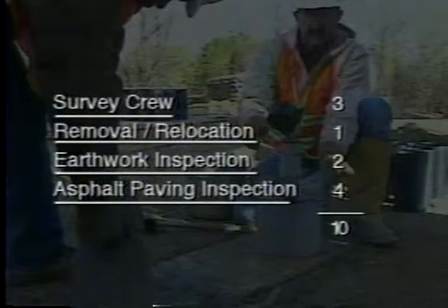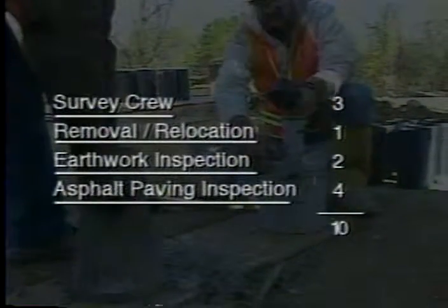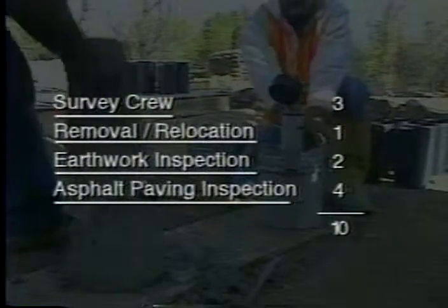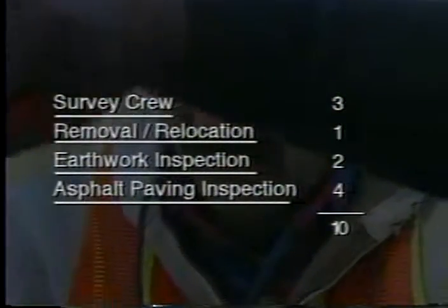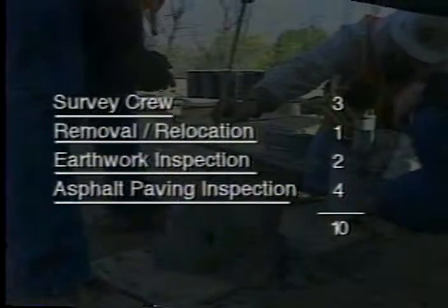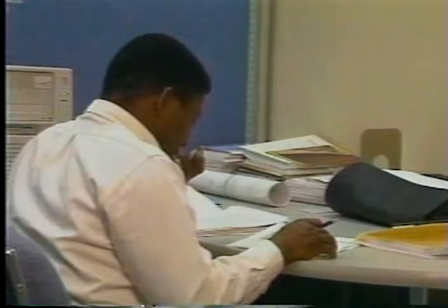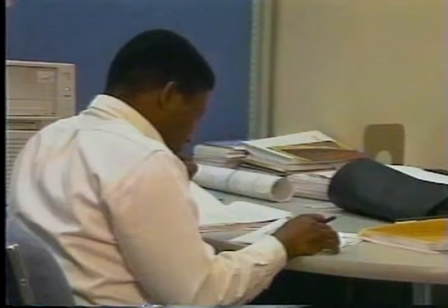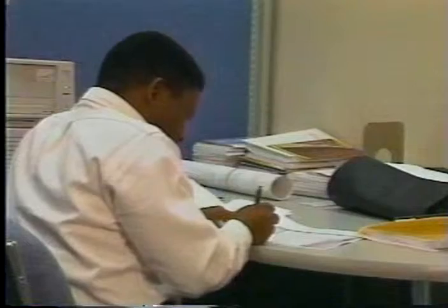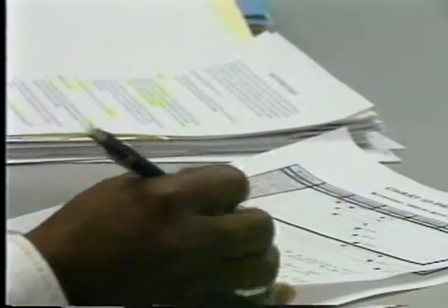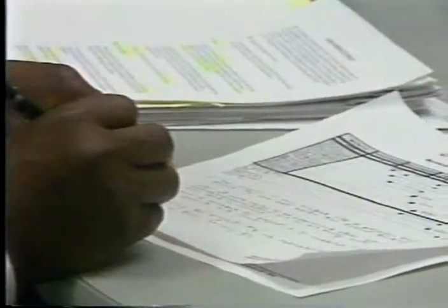The number of personnel would be less for minor contracts, and at other times when the contractor's productivity requires only part-time inspection. Each agency should modify the maximum staffing guidelines to fit its own work methods. Contract assignments, which are never performed by field construction personnel, should be omitted.